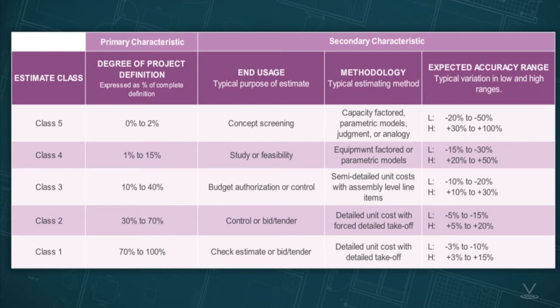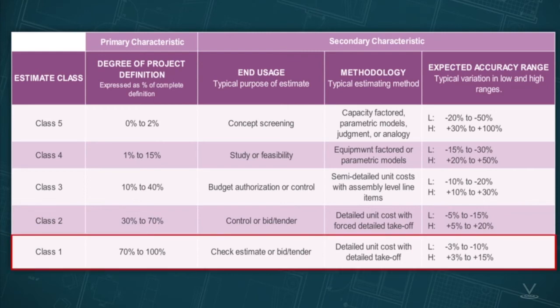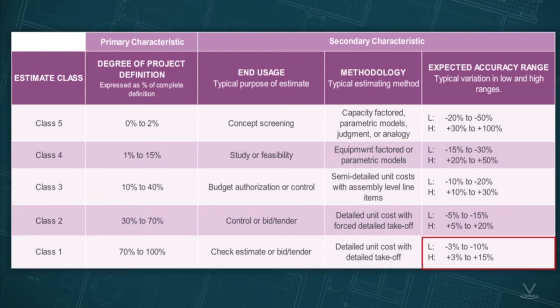As your project becomes more defined, potential risks are exposed and you become more educated on the overall project. This drives your knowledge closer to a Class 1 estimate. Now your estimate may be off as much as 10% on the low side or 15% on the high side. On a very large, several hundred million dollar project, that's a significant amount.